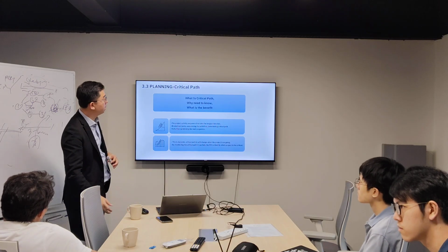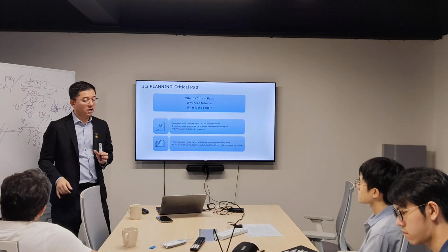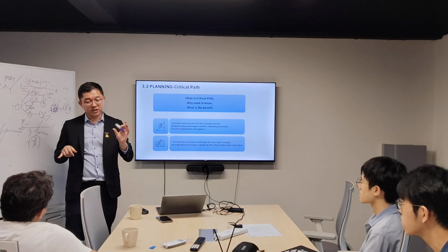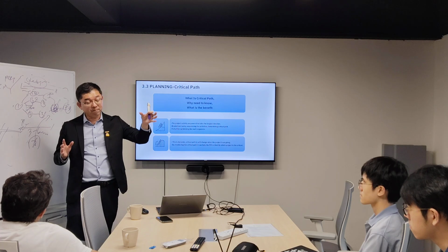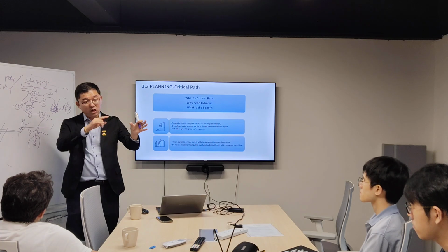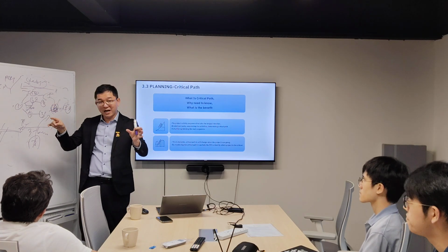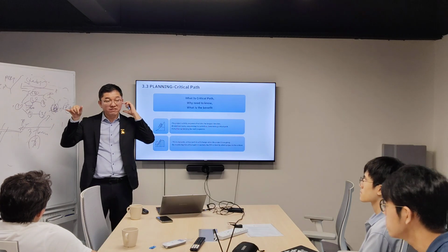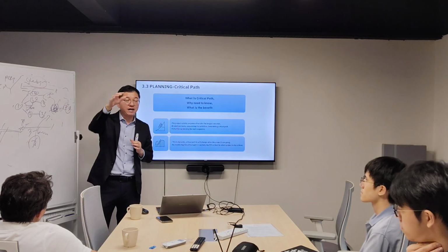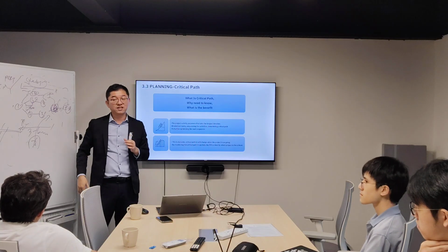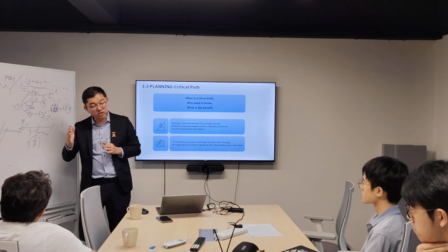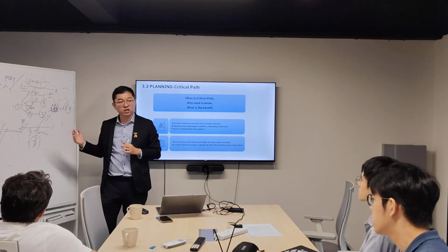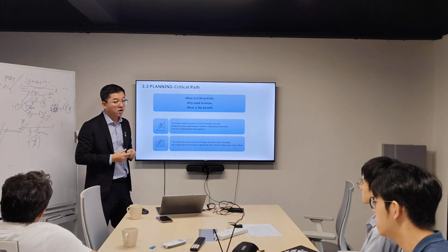No, it's not saying cannot be delayed. Critical path actually means the longest path from activity 1 until activity 6, which must be completed by the early activities first, and only then come to activity 6. So this is the longest period before you can proceed to activity 7 or the completion of the project. Okay?